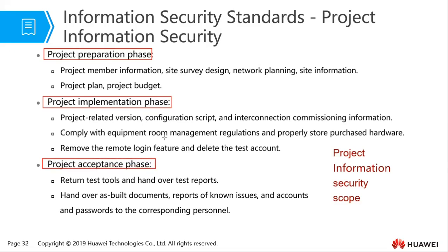And also during the project acceptance phase, we need to return test tools and hand over test reports that we used. We also are expected to hand over built documents, reports of known issues, and accounts and passwords to the corresponding personnel.